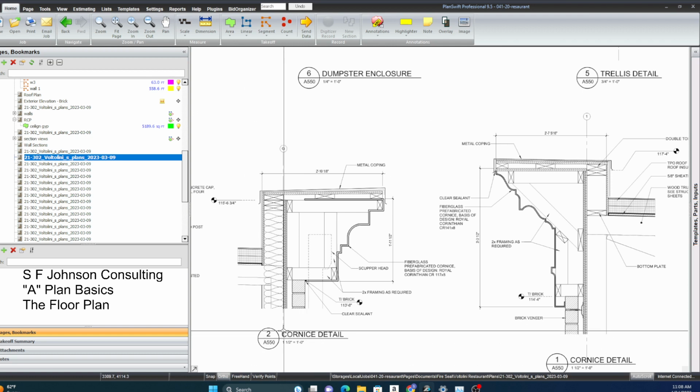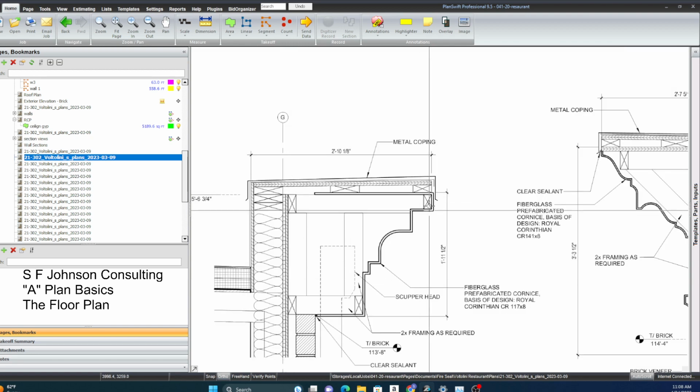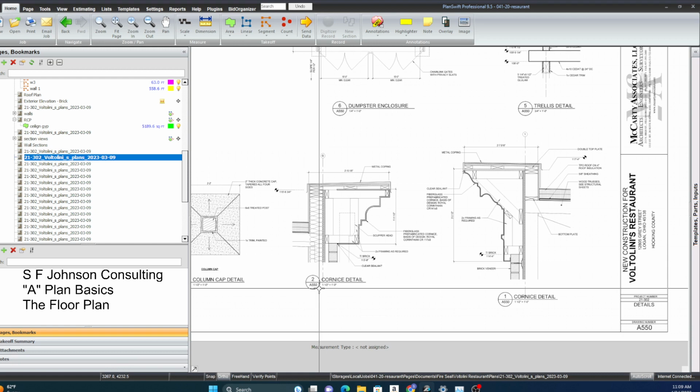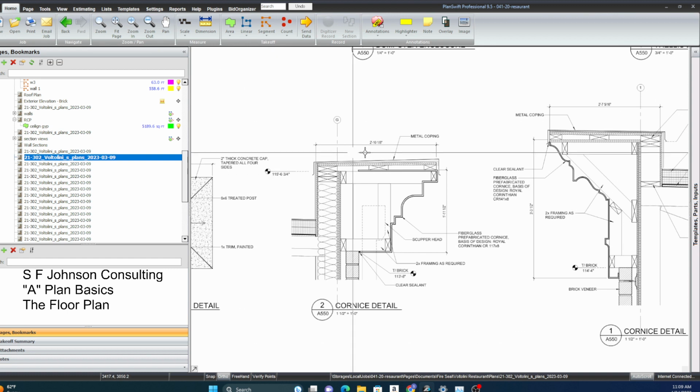And so the section is a portion of the wall. So when we measured how many linear feet at this section, then that's how many linear feet of what we see here. So if we measured 60 linear feet of this section from the floor plan, then we have 60 feet of this one, 60 feet of that one, 60 feet times 3 of that, you get it? That way you can do a very accurate material takeoff. Okay? So that's how you do that.